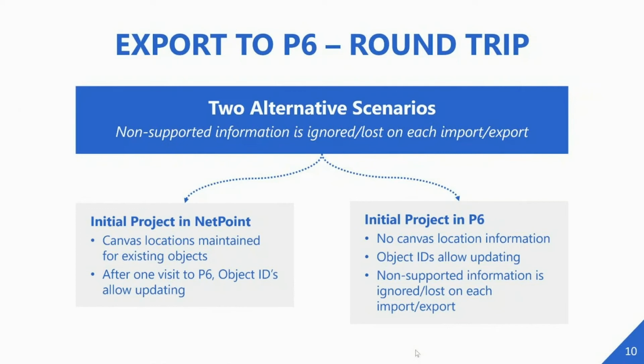If the initial project starts in NetPoint and you transfer it over to P6, NetPoint exports all its position information, which allows it to put the project in a time-scaled LDM layout, and that is saved with the P6 XER file.